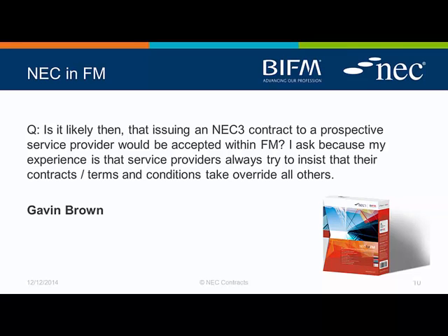There is a lot of OEM type of input, and there are times when you do need to accept the supplier's terms and conditions in those circumstances, particularly if it protects the warranty on the individual piece of equipment. But from the point of view of the more general FM contracts, I think you're quite right. It is a neutral contract form suite and works perfectly well for both sides.